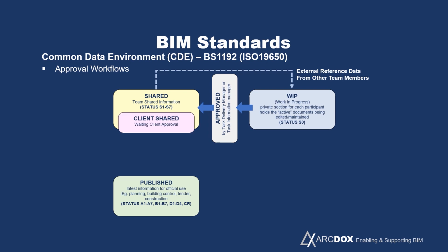The project information manager would assemble all the relevant documents to be shared with the client, and then there'll be a second approval by the client representative who formally accepts those files to be in a published state.